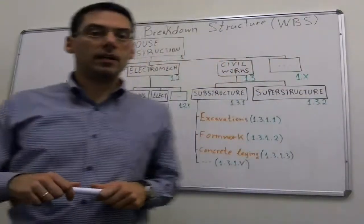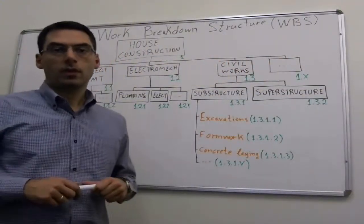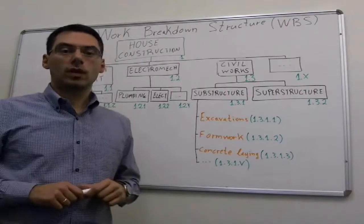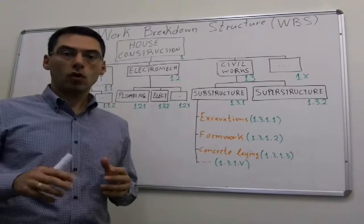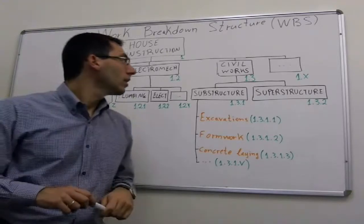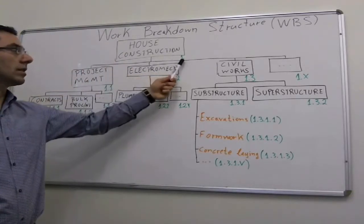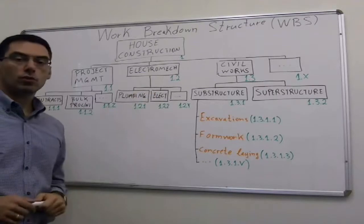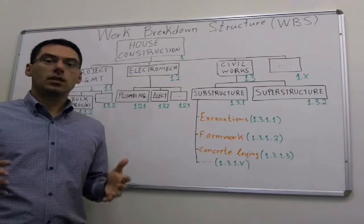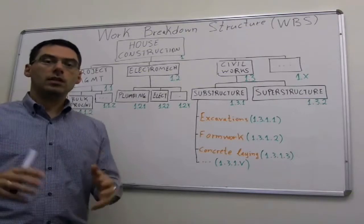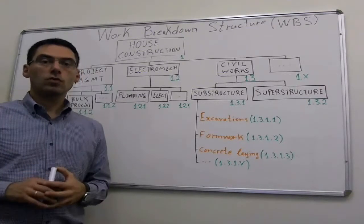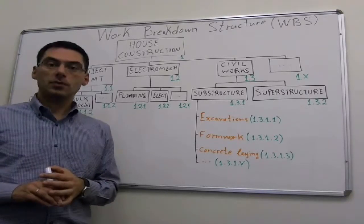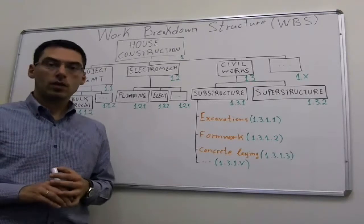How can we verify that our work breakdown structure is a good one? First of all, we need to secure that the final work breakdown structure has identifiers, codes to each element on the structure. For instance, house construction has the code 1, project management 1.1, electromechanical 1.2, and so on. The bigger our project is, the most important is to identify the codes, because these codes are going to be linked afterwards to all the other subject groups of project management, like scheduling, costing, etc.